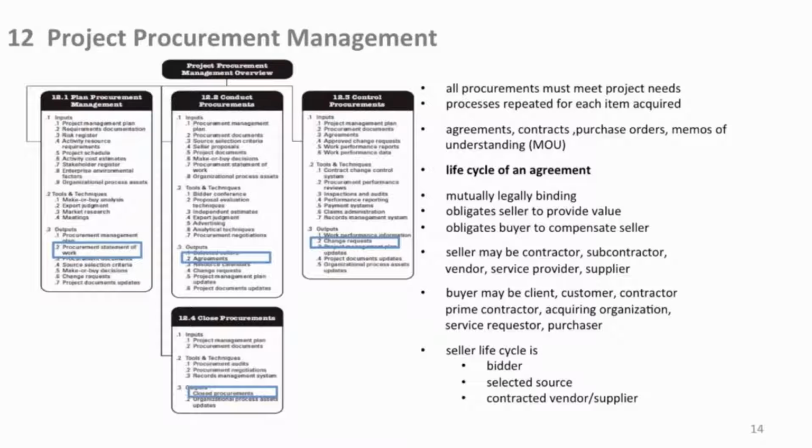Every procurement needs a procurement statement of work, which is the primary document where you go out and you solicit your bids, your quotations, so that you can place that order. So that is where everything would repeat within the plan itself. Everyone has a statement of work. Now this project procurement statement of work is a project document, okay, so you could append it to your plan so you have an ongoing list of those items, and later on you can match it up with the actual commitment there.